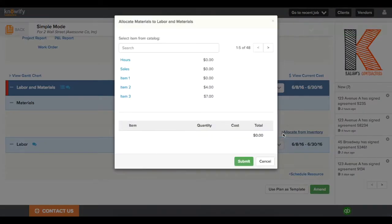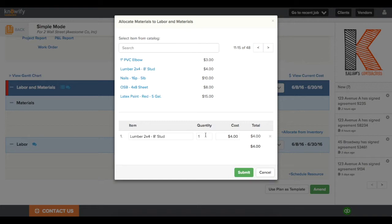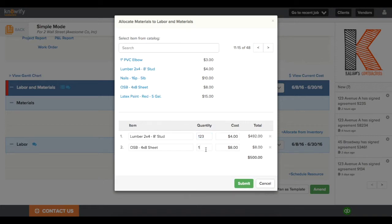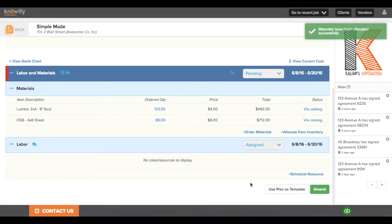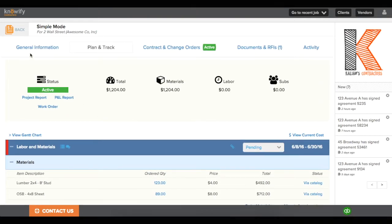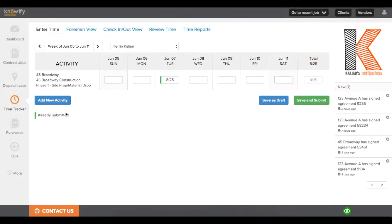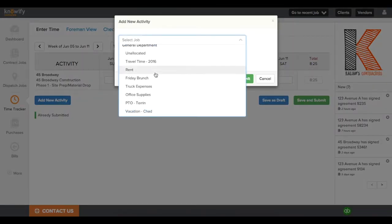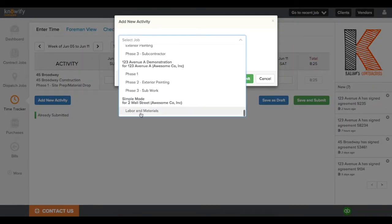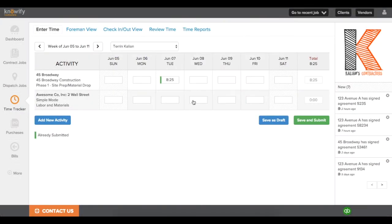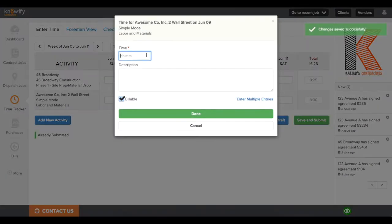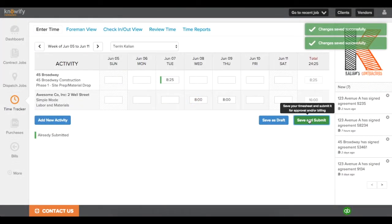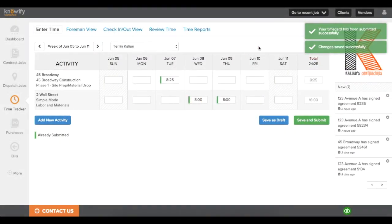This also makes scheduling easier since we don't have a whole project plan to set dates for, and we'll allocate a couple material costs to the job from our catalog. When we're tracking any of our costs to this job from outside the project plan, you'll see that any of the drop-down menus where we select our job will just have this Labor and Materials phase for us to allocate the cost to. So if one of your employees is tracking time to a job, they simply have to just choose the Labor and Materials task, and it will be tracked as part of the cost of the job.